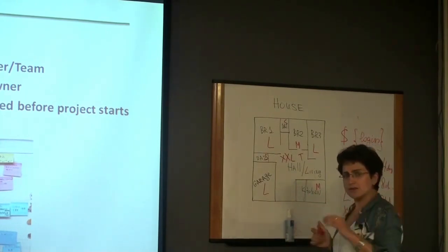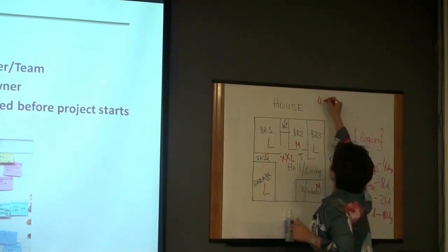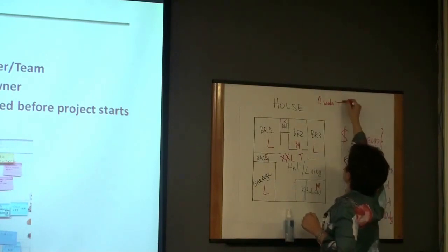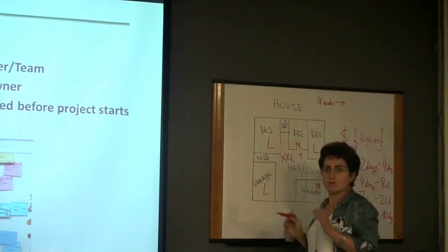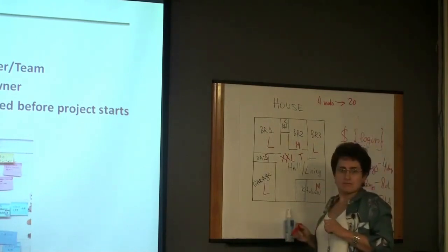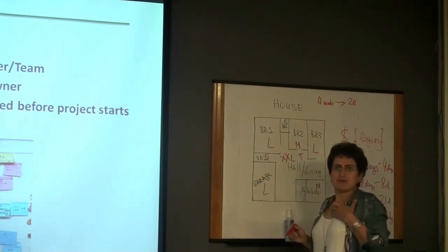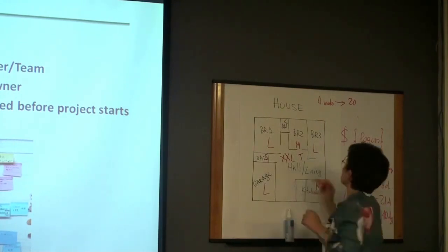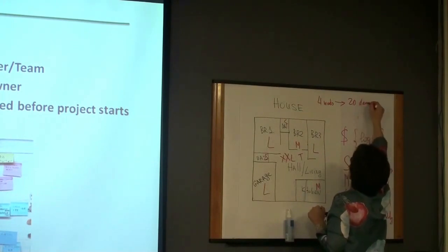If your sprint is 4 weeks, right? And you have 4 weeks, is how many days? 20 days, right? Are we working on weekends? I'm proud of you guys. So business days, we have 20 business days in 4 weeks, so it is 20 days.